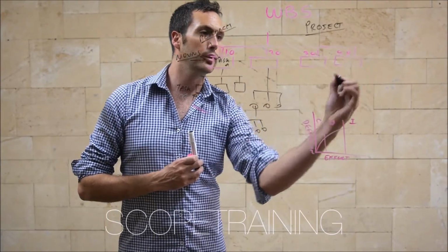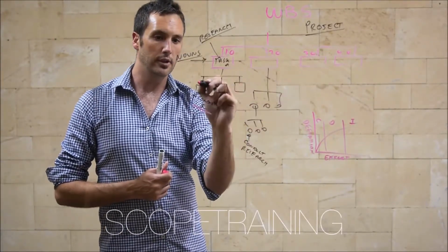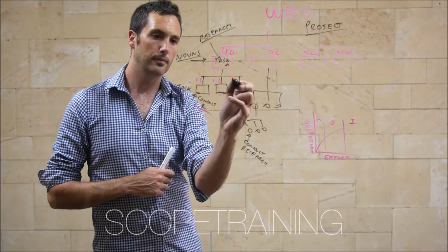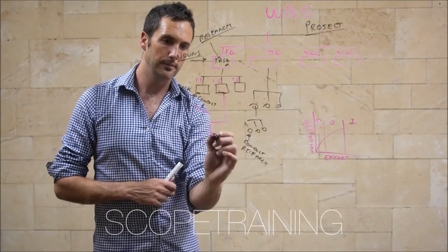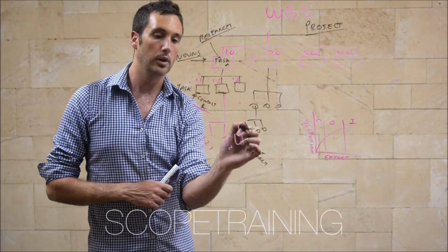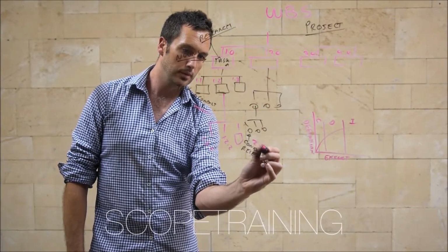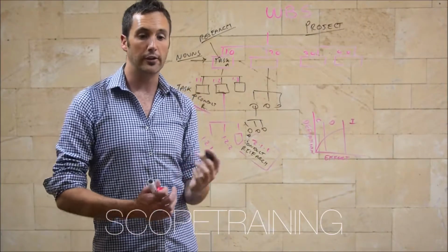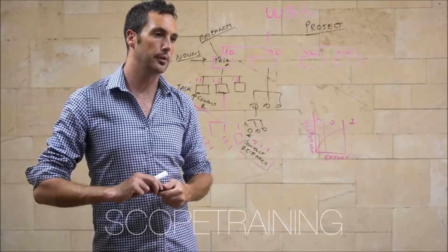And if you're familiar with numbered bullets in Word and so on, this will make sense. So as you go across, you're increasing the prefix by 1. As you go down, you're increasing the suffix by 1. So I've gone down, and now I'm going across. That makes sense? And if I was to go down further, that would be 1.2.1, 1.2.2. And I'll let you figure that one out. So this task over here would be 2.1.1. So instead of saying conduct research, I'd say look, complete activity 2.1.1, or I could just use that as a reference point. So activity 1.1 here is conduct research, to avoid any duplicity or omission of work.